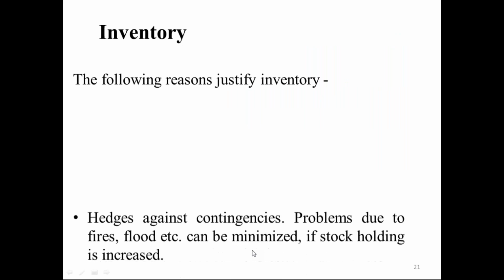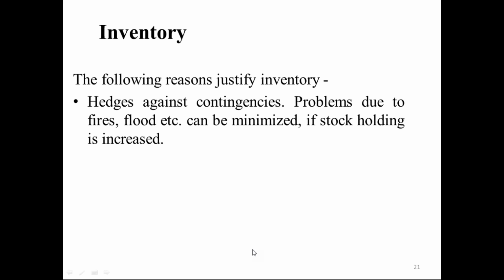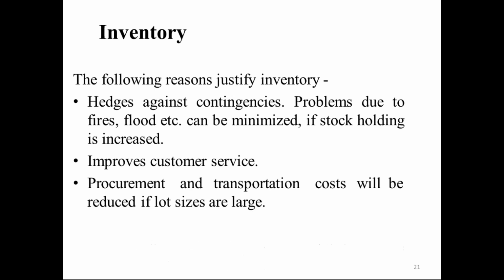The following are the reasons to justify the inventory. First one is the hedge against the contingencies. That is, problems due to fires, floods, etc. can be minimized if the stock holding is increased. Then it improves the customer service. Procurement and transportation cost will be reduced if the lot sizes are large.